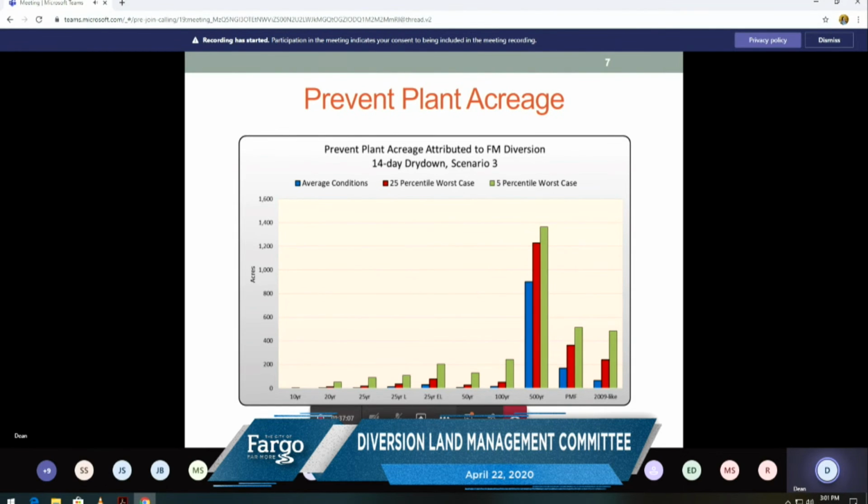And so without a lot more complicating detail, it was the safest, most conservative estimate to say, if you had some flooding on that storage area, we're going to assume all of that land is not ready to plant. In reality, that may or may not be true, depending, of course, on the natural topography of the land, the size of the flood, and if all of the land's owned by one landowner or multiple landowners. All those variations could take place.